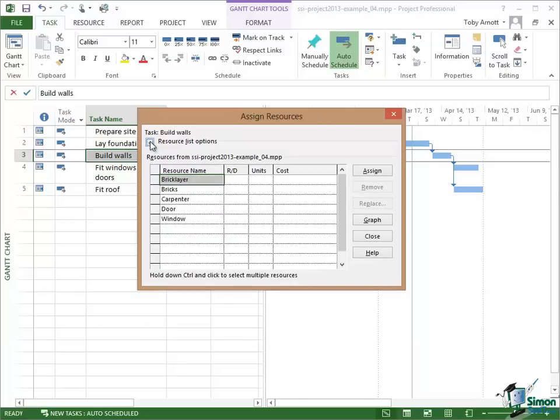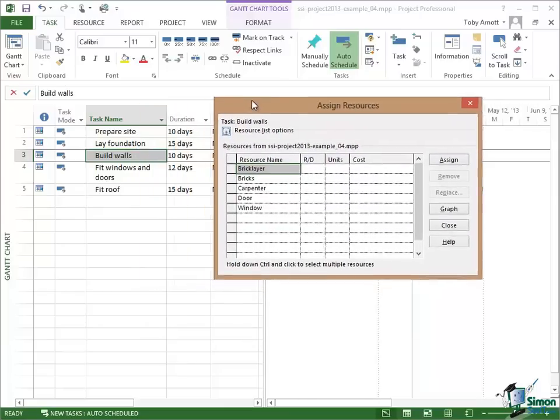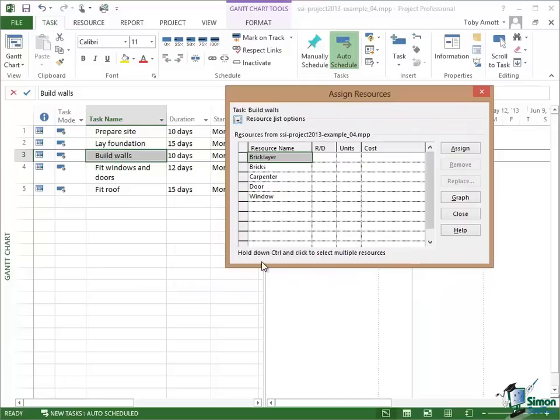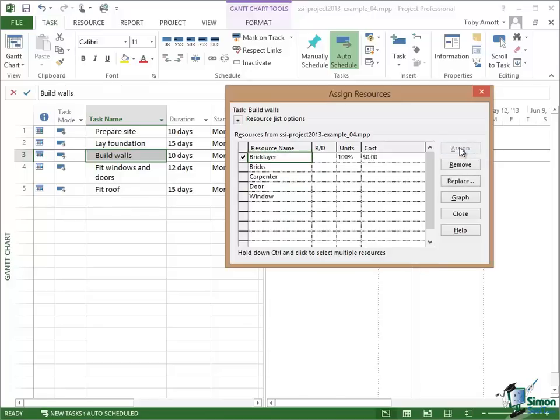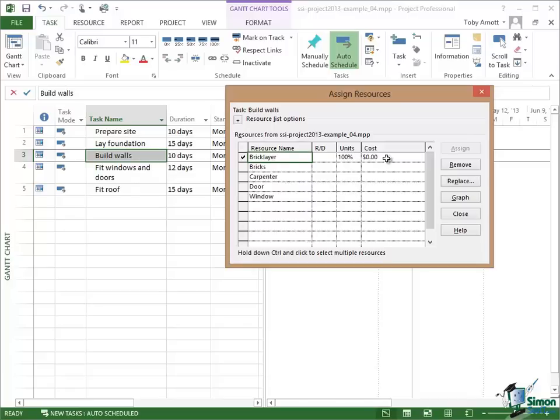For the moment, all I want to do is to allocate the bricklayer to the task of building walls. Now the very simplest way of doing that is having selected the bricklayer is to just click on the Assign button. And what happens if I just click on Assign is that the bricklayer is assigned 100%. That means one bricklayer, and depending on the cost figures, the cost of using the bricklayer on that task is indicated here.